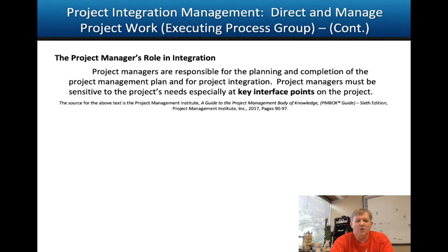Now, the PM's role, or project manager's role in integration, is to be there at key interface points, key phrase, key interface points when things come together. Think about it this way. What if you have a team building a BBX transceiver board, a team building a power amp, a team building a power supply, a team building a case to put it all in, and then you have 4 or 5 different vendors you're working with to provide parts and material for those things I just described. You as the project manager, you're going to be there when those things come together, when that thing fits together and takes shape.